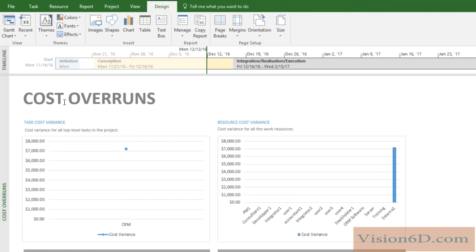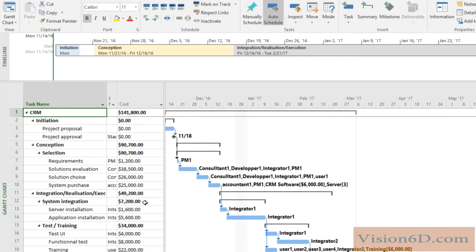The reason that I can see the cost overrun is that it's comparing the actual situation to a reference. And the reference is what we've done through the baseline. So this was the reason why I added the baseline to this project, that it can show us really where there is a cost change. We will now bring exactly the same changes in the second method of dealing with costs in a project.